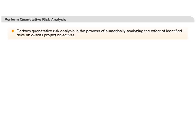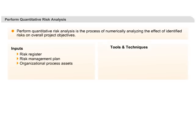The updated list of the risk register is the input to quantitative risk analysis. The numerical quantitative risk data is usually collected by analysing past project data or by expert judgement. Sometimes numerical data are also used for simulation, and one of the simulation techniques is Monte Carlo analysis.